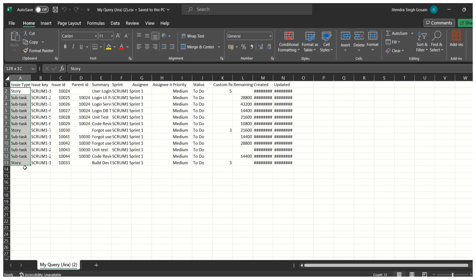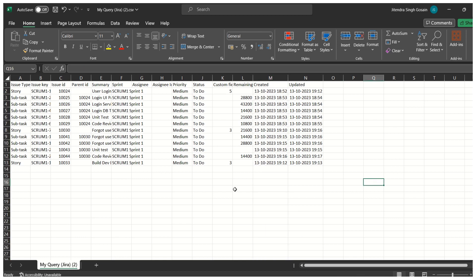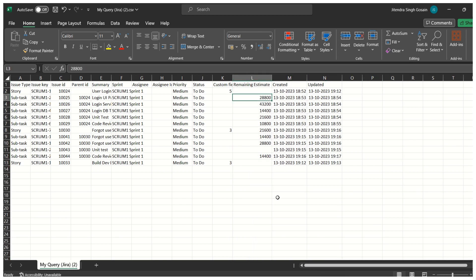Opening the exported file, we can see a count of 12 items — three stories and nine tasks (five subtasks for the first story, four for the second). This is handy when you want to share your sprint backlog with team members who may not have Jira access, or with other teams. The filter columns include 'Created', 'Updated', and 'Remaining Estimate' — where subtask estimates are shown in seconds since Jira exports time in seconds.